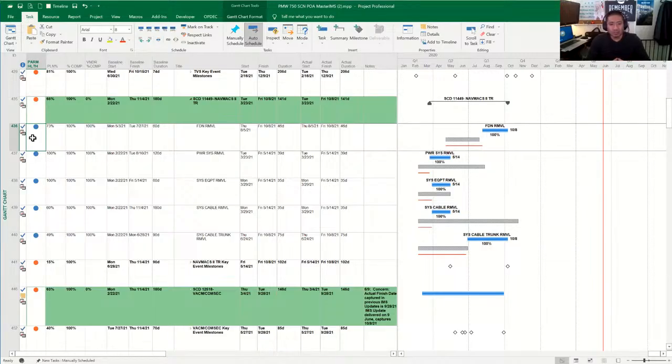Yellow meaning it's an area of concern, and we should discuss it and monitor the progress of it. Green is in progress, and we're expected to be on track. So as you see here, yes, they completed this task on October 8th, 2021, but as a whole task, they encountered delays.